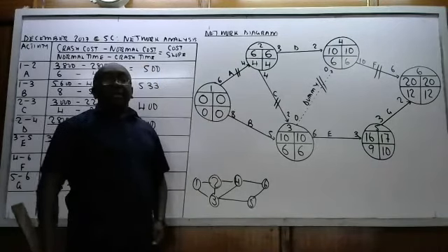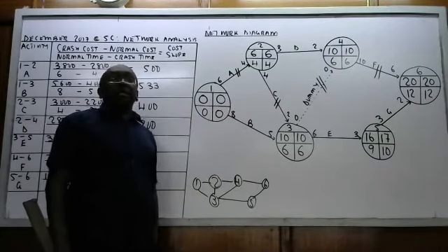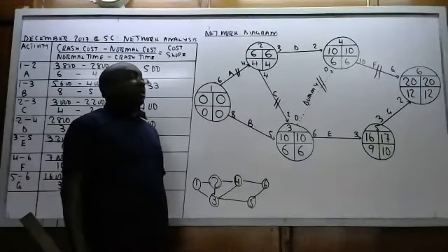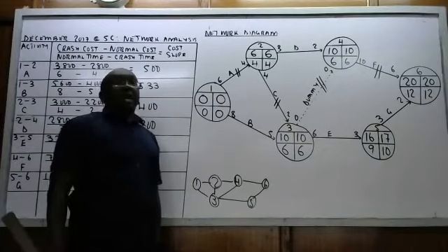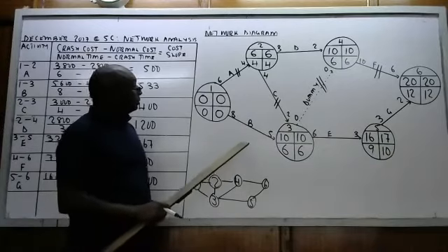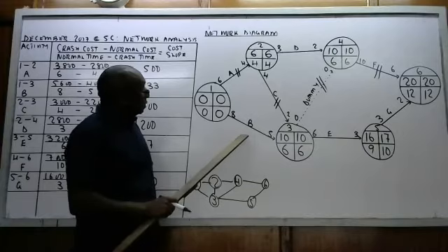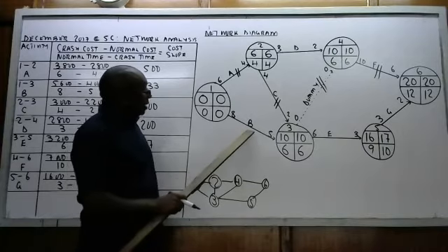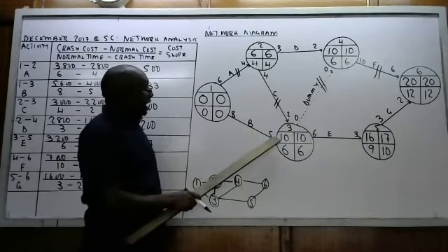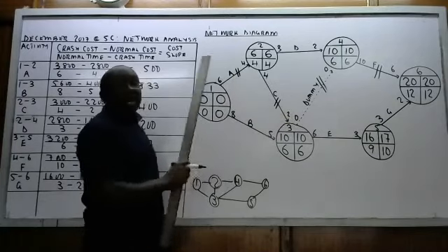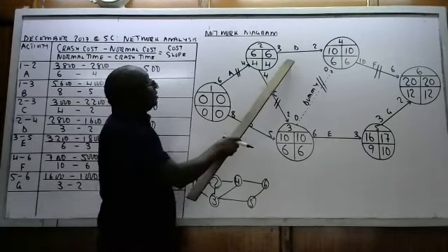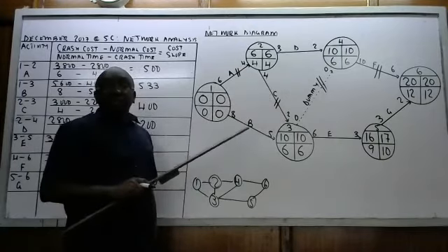So again, checking what we have said or how we have said it should be checked. You realize that this one is not critical because it has 5, but A and C are critical, 2 and 4, that is 6. Then this one, D now becomes critical.